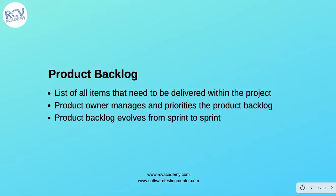The next thing is the product backlog. The product backlog is a list of items or requirements that need to be delivered within the project. For example, if you have a project of six months or one year, you define the product backlog based on the end goal. The product backlog is basically the set of user stories and epics that define the requirements for the whole product. The product owner manages and prioritizes the product backlog.